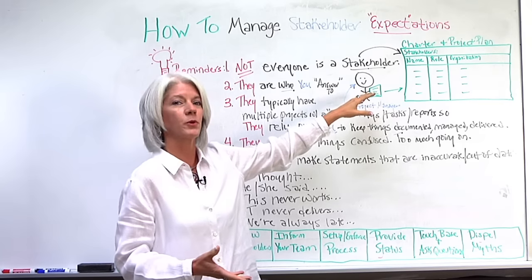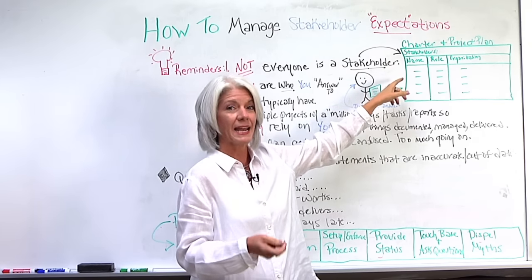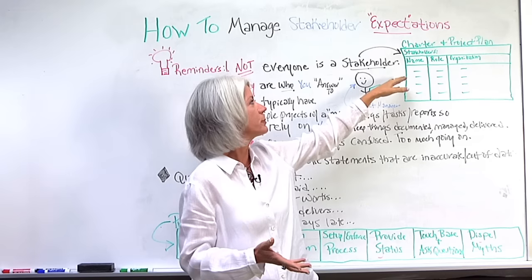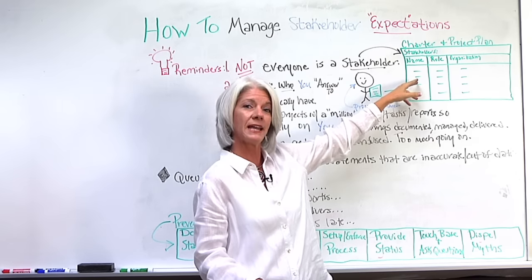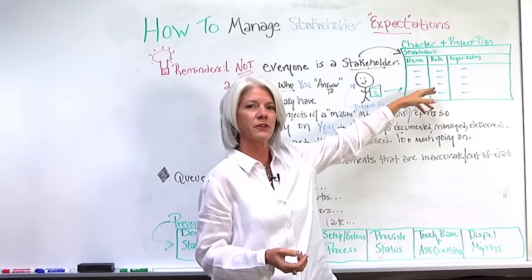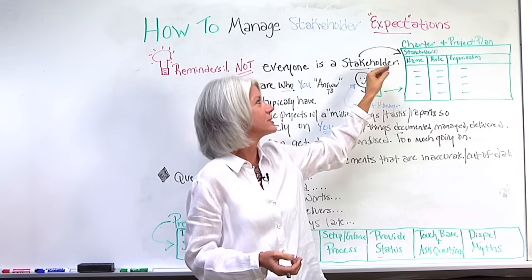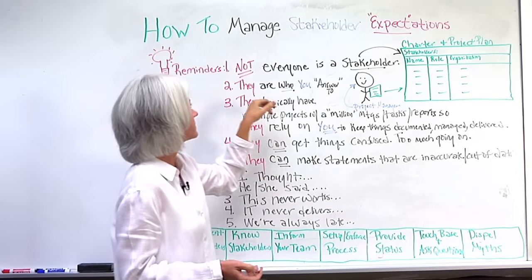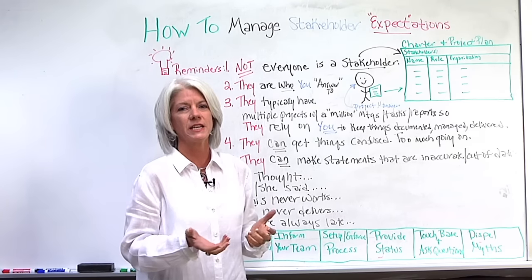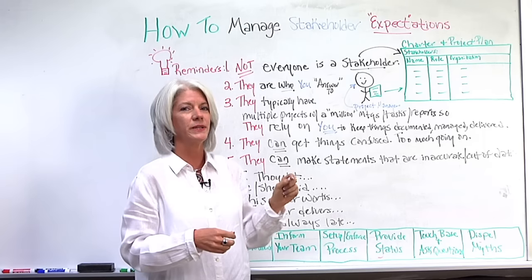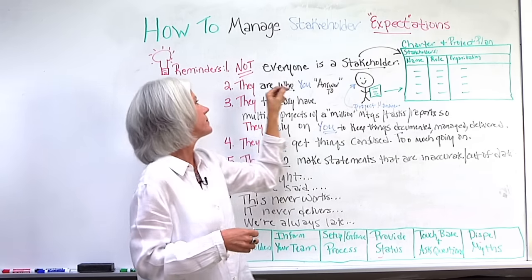The formal stakeholders are documented typically in your charter and/or your project plan. Stakeholders will be identified by name, the role they're playing on the project, and the organization they're representing. Those are the true stakeholders. Anyone else from those organizations who has feedback needs to be redirected to their stakeholders for them to provide input through the proper channels.